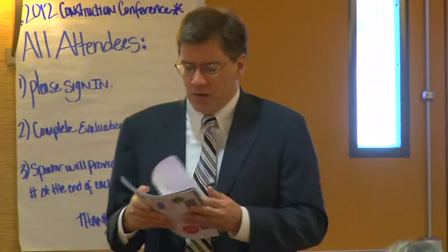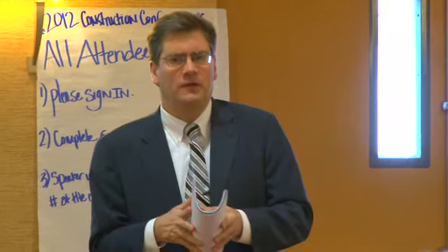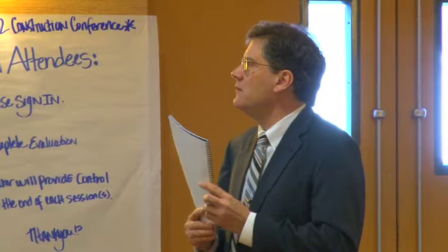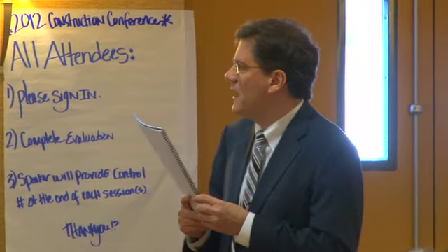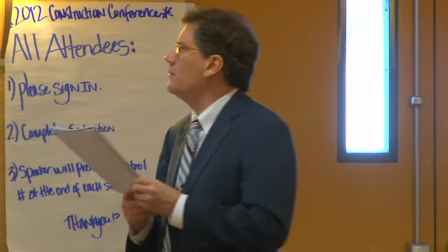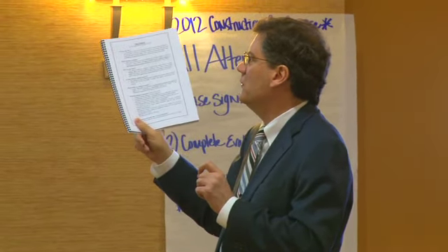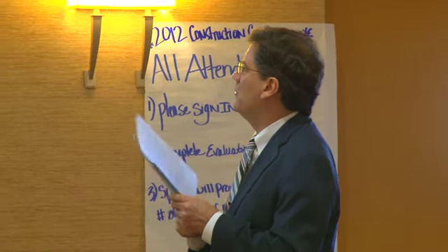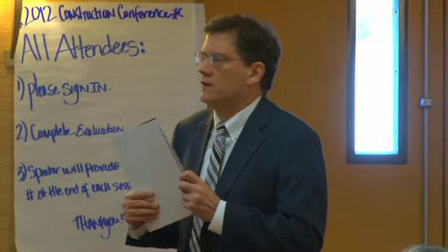Okay. I want to talk about stop notices for a minute, and that's on page 15. It wasn't really within the scope of what we were going to cover, but I'd like you to know the value of a stop notice and that you should use it as a redundant payment collection device. What is a stop notice? It's a device to freeze, essentially a temporary restraining order against the flow of money from an owner to the contractor, or from a construction lender to an owner, until the stop notice claimant has been paid. The owner or construction lender must withhold an amount that is sufficient to cover the stop notice claim.